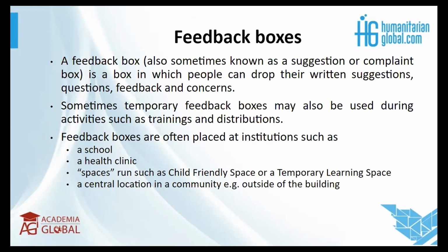It should be a place where it's accessible, but at the same time, it's not where everyone can see you when you're putting in the feedback. So for example, in a school, it shouldn't be at the front of the school where everyone is passing at any time and they can just see you dropping it, because that limits your ability to trust that no one will see you doing it, or you don't want to be traced to be the person who's giving that feedback. You really want to feel that it's going to be anonymous and confidential to you.